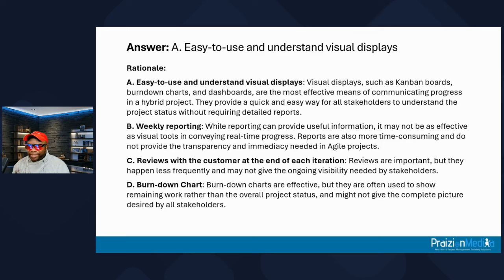Dashboards, things like that. Now, while burn charts are not bad, remember we're always looking for the best answer. So the most inclusive answer, the best answer, is actually A. Burn charts are not bad, but they're often used to show remaining work rather than overall project status, and they may not give the complete picture compared to a Kanban board, dashboards, and things such as that.